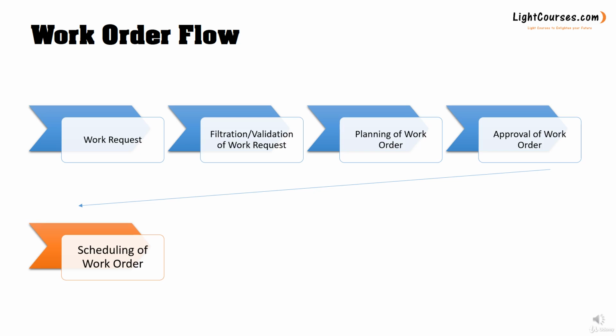The person in charge of scheduling should arrange with the other parties, for example the operation team, the proper time for stopping the equipment if the job needs the equipment to be stopped in order to be completed.